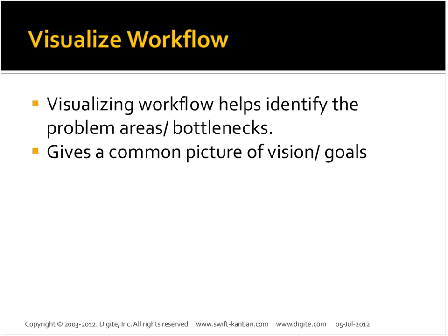So one of the things that Kanban proposes is that you visualize your entire workflow together, right from where a customer request comes in, to how it is getting prioritized, executed, validated, and deployed. You visualize the whole flow, and then start seeing where the delay is coming, where the wait time is creeping in, so that you can remove those and come to a smooth flow, where a customer requests a feature, and it goes through the entire value stream and gets deployed.